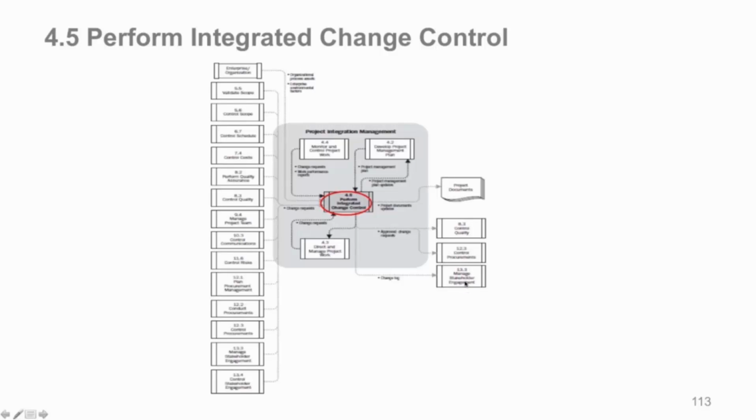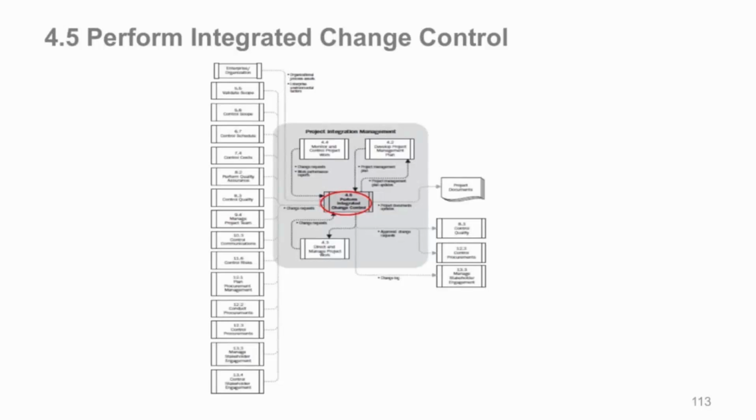Now, isn't that strange? Well, no, it isn't, because the stakeholders are the ones that want to know what's being changed on their project. So you bring the change log to them. Other activities like manage the work, they get the approved change requests directly, and they act on those. But as far as a list of all the changes that were made and approved or even rejected, go to the stakeholders so they can see just the dynamics behind what is happening with their project regarding changes to it. So that's what happens there.